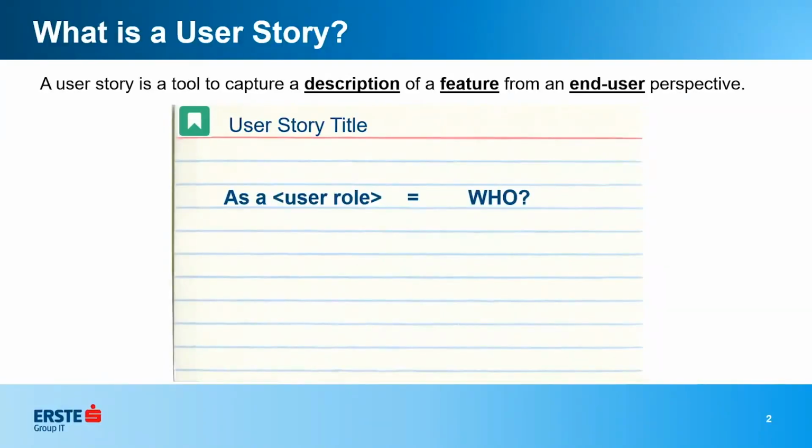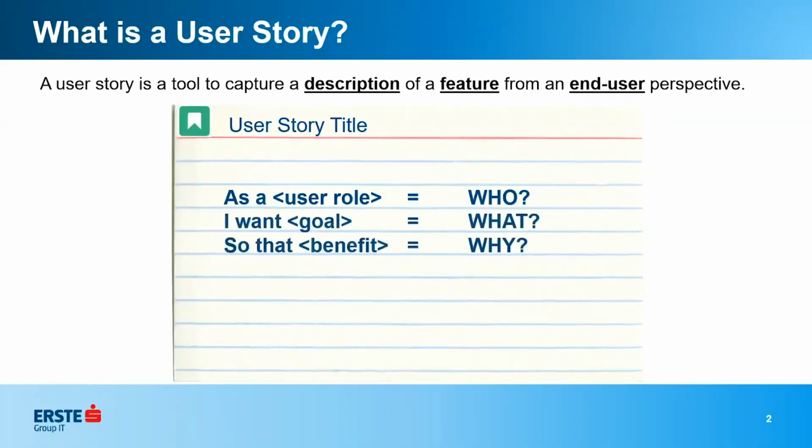This is one example of how user stories are written, because it's easy to not forget the different aspects of a good user story. So the who, what, and why, you can write it however you want. You can say, as a user of this app, I want to be able to pay my balance so that I don't get any late fees.